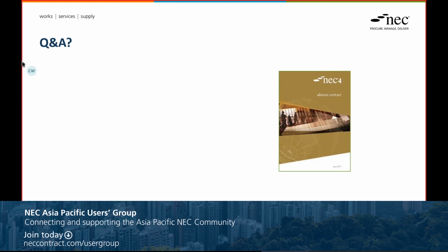But recently, what I've understood from Australia is it has moved back from the alliancing market, and that's probably because alliancing isn't a good fit for all projects or organisations. It's horses for courses. Sometimes it's build only for a contractor, sometimes design and build, sometimes DBO, sometimes use X12, sometimes use the alliance contract. You have got to select the right procurement route for your particular project.